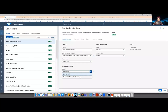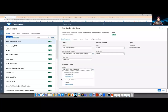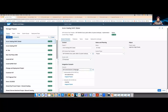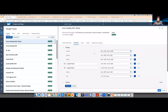There are also integration scenarios. Right now we have one: if you're using SAP Central Business Configuration, you can connect it to your SAP Cloud ALM project. Project activities from SAP Central Business Configuration will then appear as tasks on the SAP Cloud ALM side. Tasks from CBC are read-only in SAP Cloud ALM because those project activities are managed on the Central Business Configuration side — Cloud ALM just receives the status in read-only format.